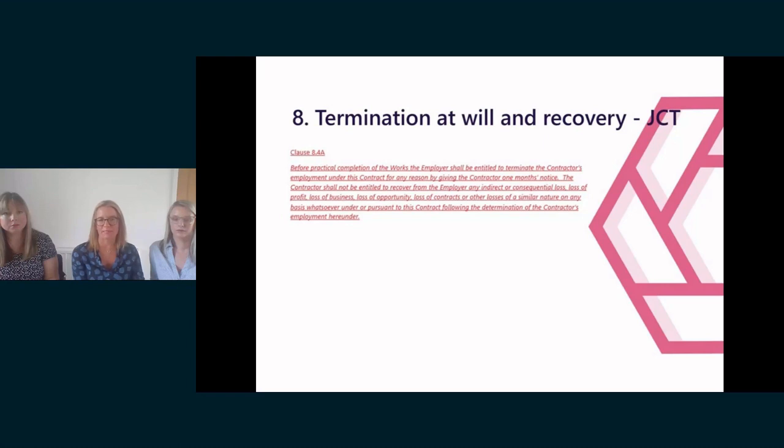Now, what I'm going to be talking about today is termination at will. The term termination at will means that parties are able to terminate if they choose to do so, without having to identify and prove a default of the other party to validly terminate. You may ask, why is this such an issue? If you are terminated, will you be paid your loss of profit for the balance of the works on termination?